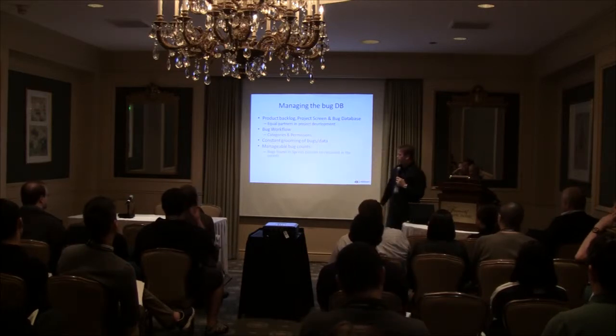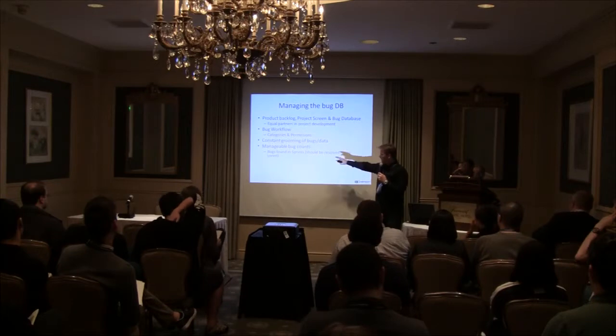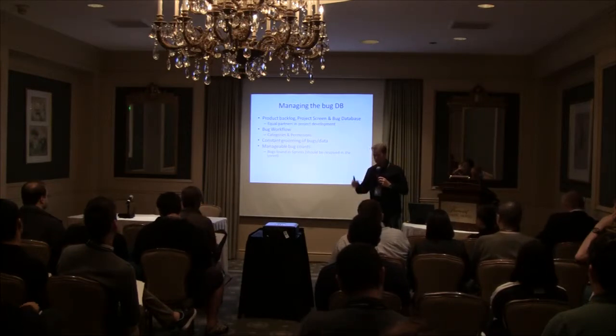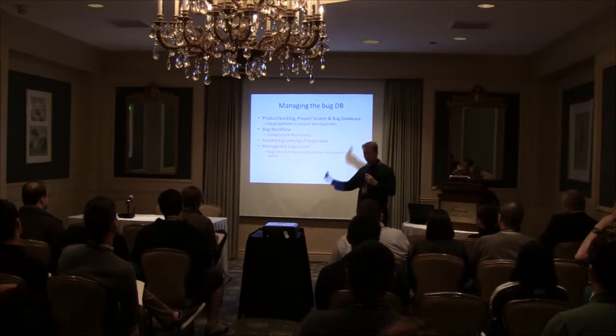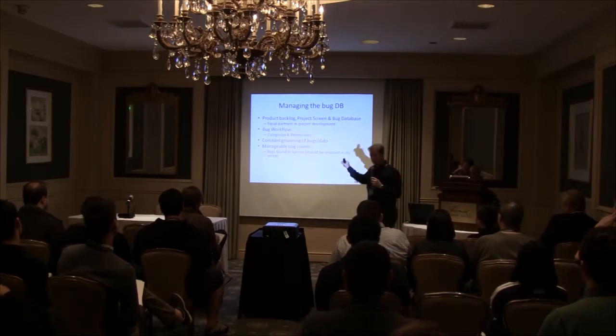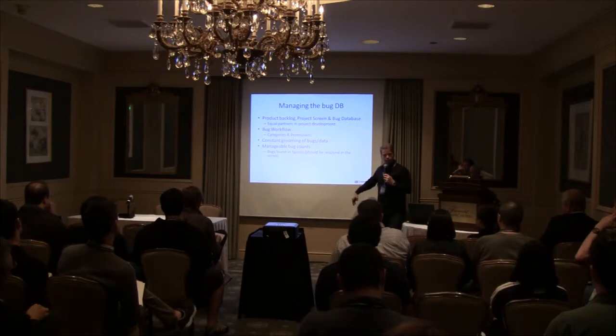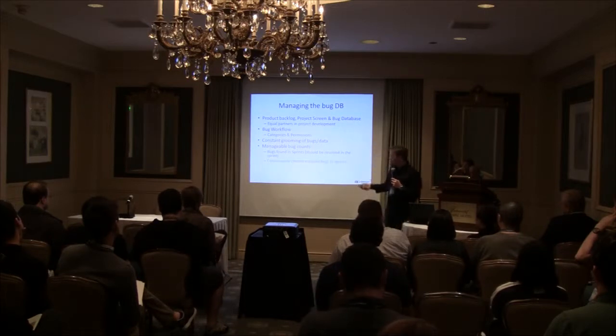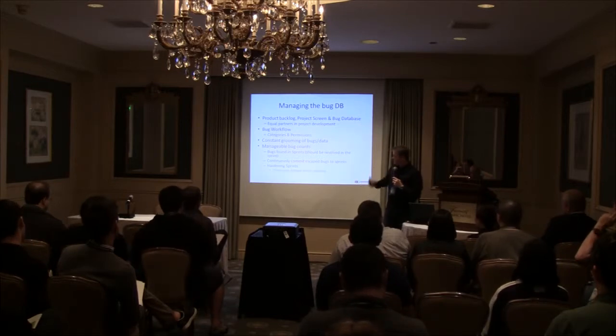Manageable bug counts. Bugs found in sprints should be resolved in sprints. We've talked about this a little bit already. If I'm developing a feature in a sprint, that bug gets resolved in that sprint, even if it causes later work or the cascading work to be pushed out. It's more important to leave the sprint with a quality product than with a quantity product. And then, of course, continuously commit escape bugs to sprints.